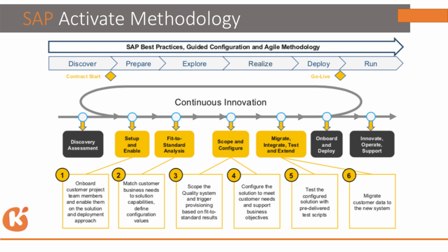phase. In this particular phase, we are discussing with the client and getting requirements in the form of workshops. We call them workshops. During the workshops, we can get all requirements from the client. We can also see what the current existing system configuration is, and what the client requirements are, and we can see what the solution for that is, and whether there are any gaps during the implementation. Whatever we are getting from the client requirement, first we need to see what is feasible and what is not feasible. If it is not feasible, what is the workaround for that, and are there any gaps which cannot be accommodated through implementation. Those things we need to identify.